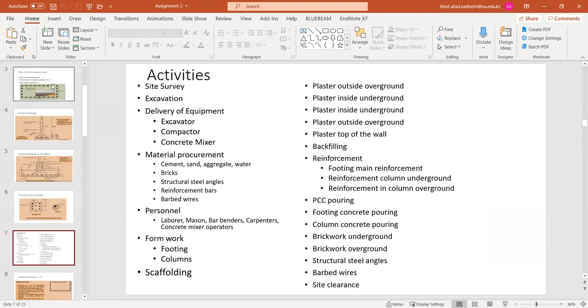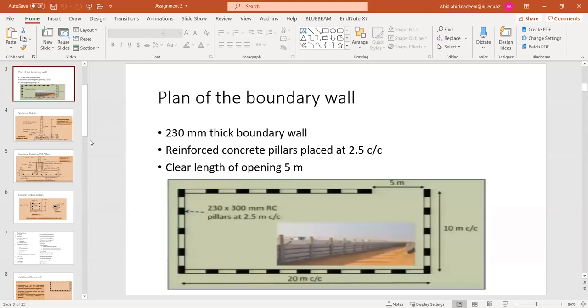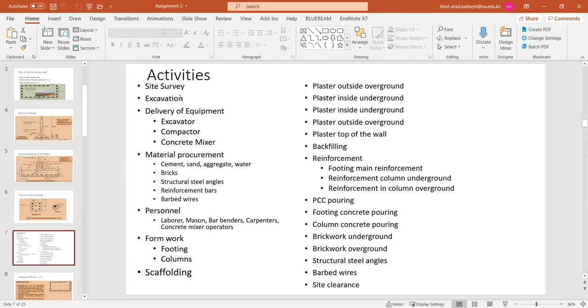needs to be started. But here, I think a little practical step is that when describing the excavation, the description of the activities is also important. Here, as a summary, we have just written that it is an excavation. However, the project's specifications should be more detailed than just names of the activities. For example, in those project specifications, the excavation activity may also include the provision of lateral support or so forth or not, okay, in this case.